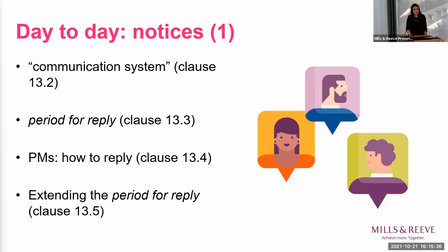In terms of the period for reply, which Stuart's already mentioned, if the project manager, supervisor or contractor has to reply to a communication, they have to do it within the period for reply, which is 2 weeks. That's important because if you don't reply within the period for reply, you can end up missing deadlines, which can have a deeming effect on some parts of the contract, and it's therefore pretty important. Clause 13.4 sets out how to reply.